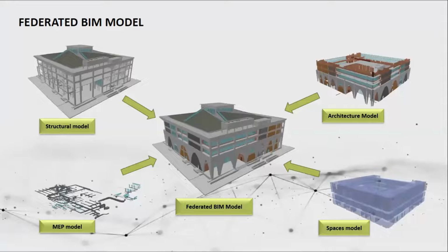With multiple stakeholders in a project, different packages will be there. So the contractor can create the model for their packages alone. For example, structural model, MEP, mechanical, electrical, HVAC, fire and plumbing: different packages, different models will be created. And together we can bring them into a single model. That is, a federated BIM model can be created in Bexel Manager by collecting different models.